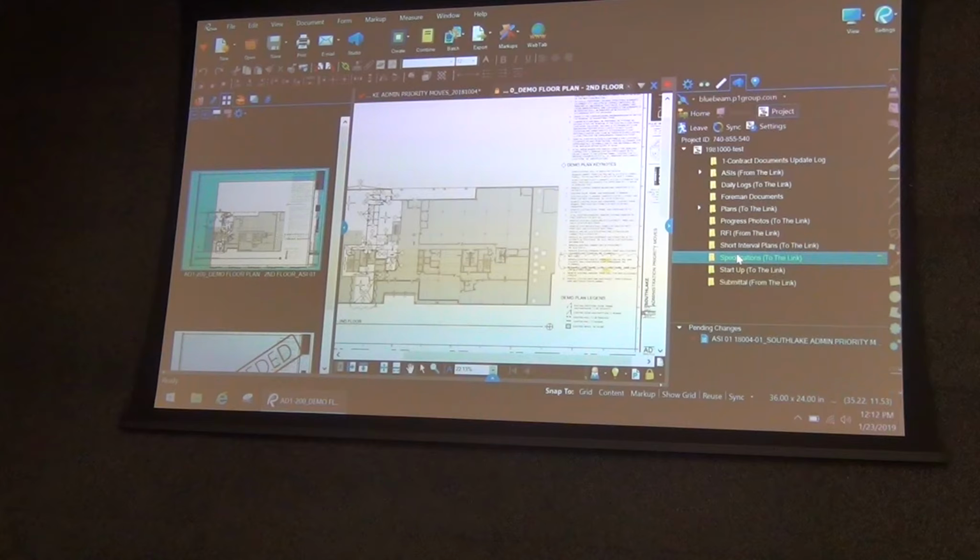Initially, we were doing manual, like we'd go through and pick the pages we wanted extracted, and then one of our project coordinators learned about extracting by using the bookmarks. So that was a big deal when we figured that out, because by doing that auto label, you can get the extracting to still work based on the bookmark. So this has evolved.